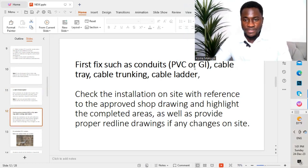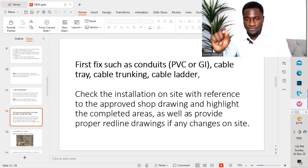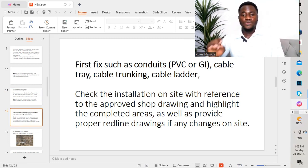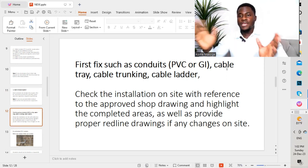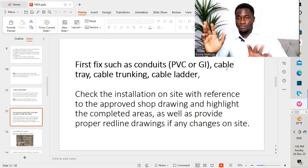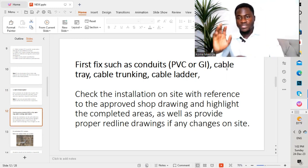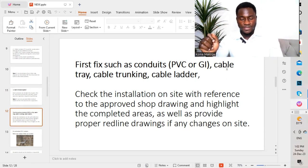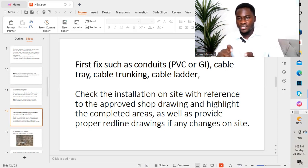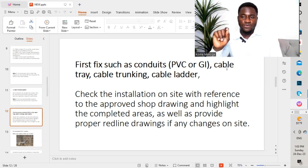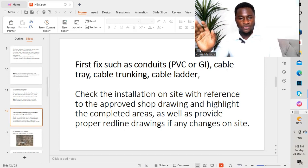We have the first fix — such as PVC or GI conduit, cable tray, cable drawing, and cable ladder. The different things we have to take into consideration before submitting to the consultant for review and approval: first, we check the installation on site with reference to the approved shop drawing and highlight the completed areas. You don't just highlight all areas — you highlight only the portion which is completed and submit to the consultant. Also, provide proper red line drawings if there are any changes on site. A red line drawing is a replica of what has been carried out on site, with adjustments made in the drawing as well.